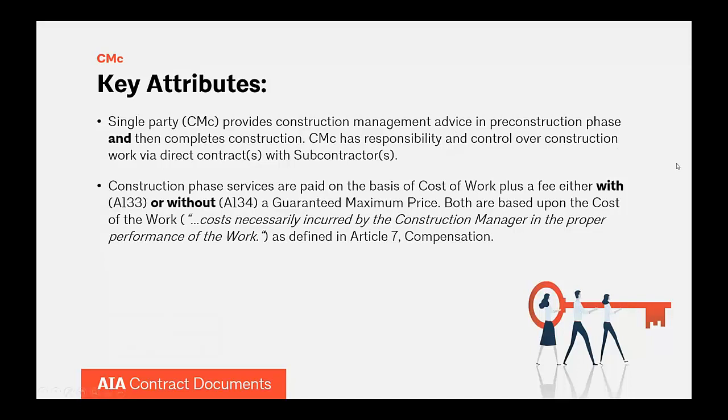Thank you. During the pre-construction phase, the construction manager acts in an advisory role, providing expertise in cost estimating and scheduling, constructability and bidability reviews of the architect documents, subcontractor selection, and even early releases of work. Once the construction price proposal is offered and accepted by the owner, the construction manager converts to a traditional contractor role.